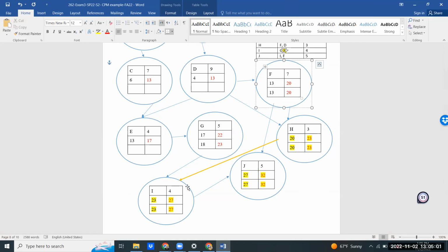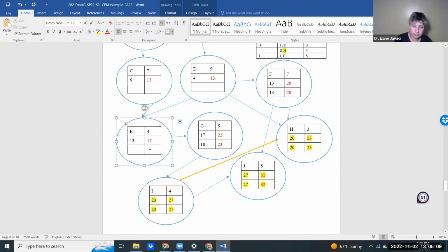E, Sharon. Would it be 18 and then 14? Yeah, so G comes after it. Latest start is 18, means that the latest this one can finish is 18. 18 minus 4, 14. Perfect, Jenny, Sharon, thank you. Brandon, you're next, and we're going to D.